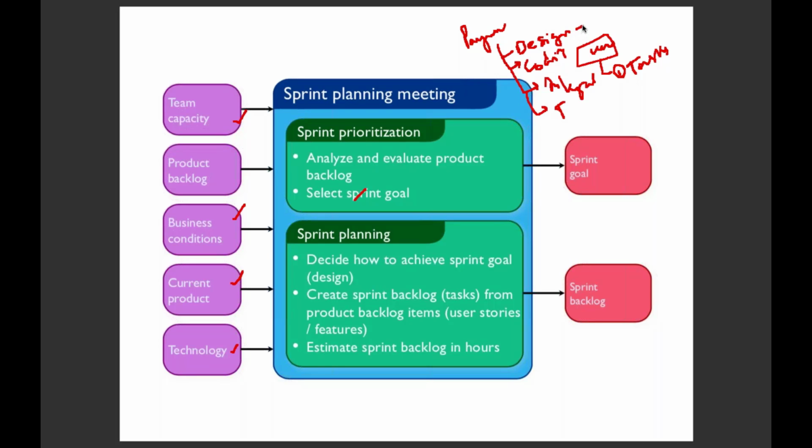So for designing, how many hours? They do an hours estimation here. For designing, it will take 4 hours. For coding, ideally it should take 12 hours, right? And for integration with the various banking software, credit card software, let us say it takes 20 hours. For testing, it takes 5 hours. So in total, this particular user story takes 41 hours.